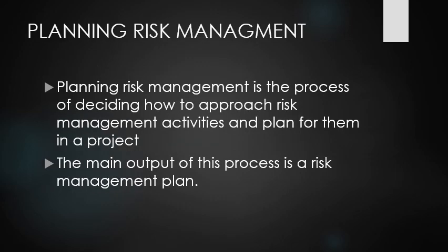First, planning risk management. Planning risk management is the process of deciding how to approach risk management activities and plan for them in a project. A risk management plan document is the procedure for managing risk throughout the project. Project teams should hold several planning meetings early in the project's life cycle to help develop the risk management plan.